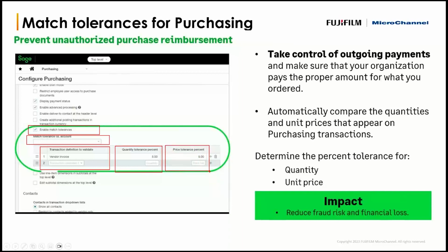Obviously, if it's a $2,000 document that we're approving, that 5% is not much. But if it is a $300,000 document, we understand that 5% might not be a good idea, because that's quite a hefty change that we want to get through. So we'll look at additional options for that tolerance, but for now there is the ability to do that at the percentage level.